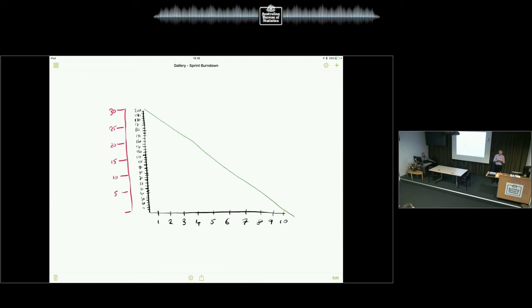So what you want to have is either parallel or tending towards completion. So if you see that more and more work is being added to the backlog and faster than you can take it away, that's a challenge. And this is why we measure the cycle time. And we can timestamp the work when it comes in and see how long it is until it's delivered. So that's a technique with Kanban. But for Scrum, we have what's known as a sprint burndown chart.